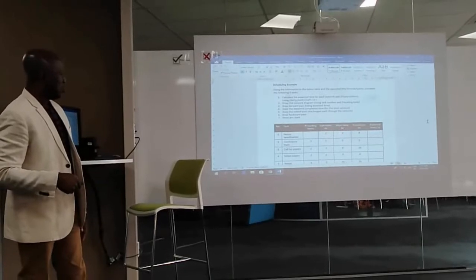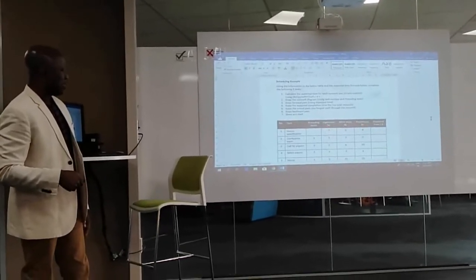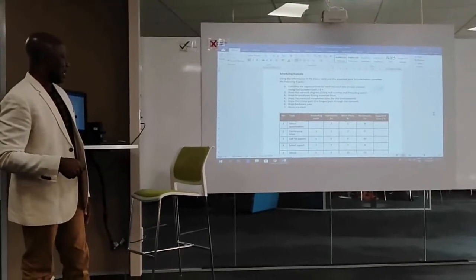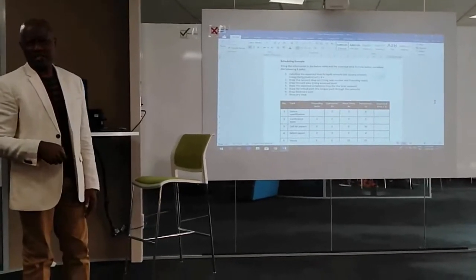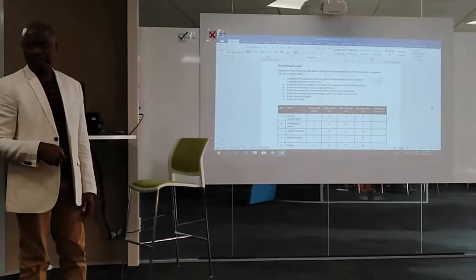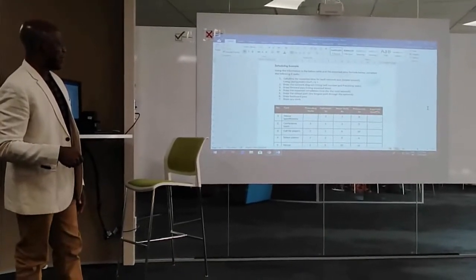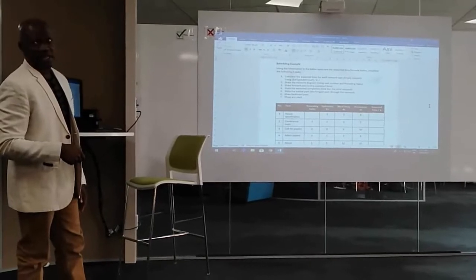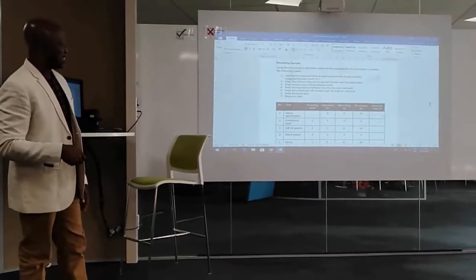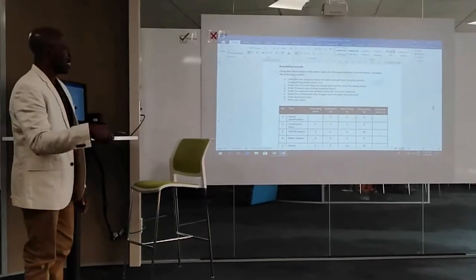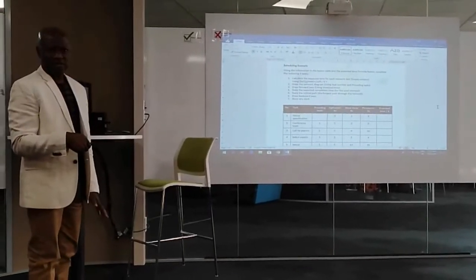This is 2 times 1. Yeah. This is 2 times 4, which is 8. This is 8 times 1. That's going to be 18. Am I right? Yeah. So it's going to be 18 divided by 6. You can see the expected time here. 18 divided by 6 is going to be 3. Are you sure? Yeah. So we're going to work out the rest ourselves now, quickly, right?